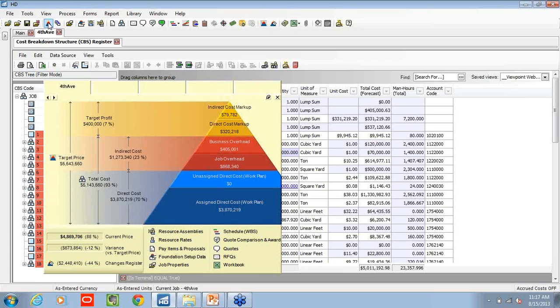So we might want to switch to our data map that gives us a high-level overview of our target price. So for this particular job, we're looking at $5.5 million. And we can see how that breaks down between a profit, an indirect, and a direct cost.